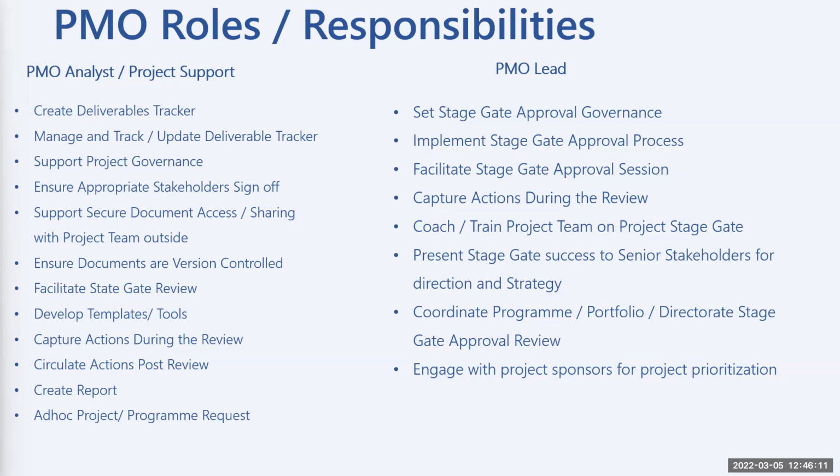So maybe at the beginning, they've given them a budget of 2 million and they've spent 10,000 or 100,000 in the first 2 stages, because they are going into the bigger stage of the project where a lot of resources and a lot of time is required. They want to draw down on the original project. So they will say, yes, we want to draw down on this as well. So they bring all of that information alongside to their stage gate.